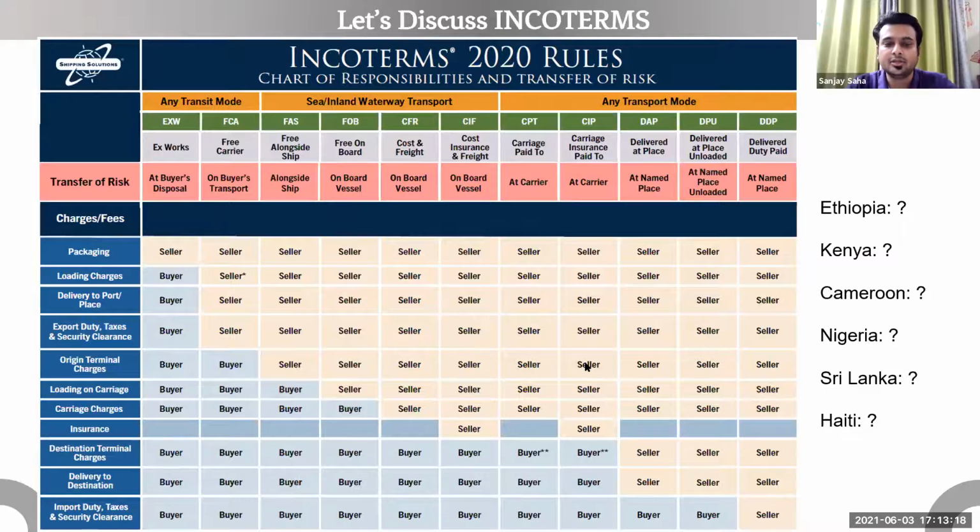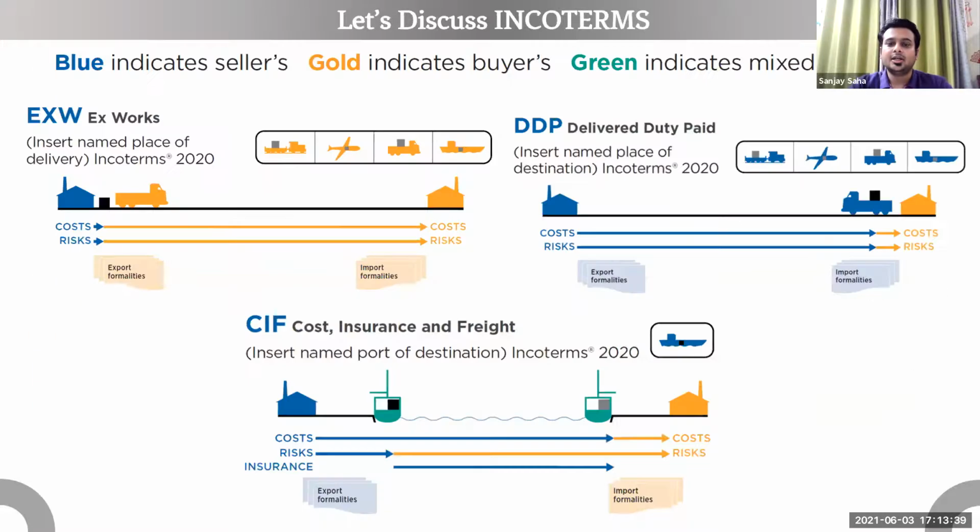Okay, so you need to be aware of these things when you are creating your contracts, purchase orders, and even before that, when you're writing your tender documents, because you cannot change Incoterms after you have done your tenders. So you need to be very mindful of that even while you're writing your tender document. That's why we're showing Incoterms at this stage.